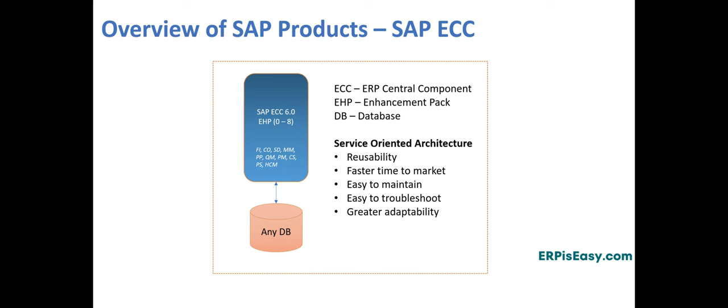SIT, system integration testing. The changes are then transferred to the SIT system for system integration testing when the unit testing is completed in the development system. This system will be linked to both SAP and non-SAP applications. As a result, developers will be able to test the end-to-end scenarios.